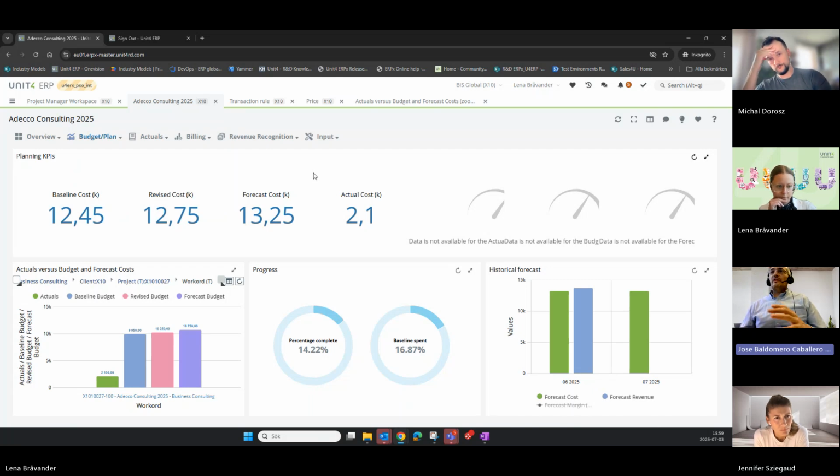I know the resources have changed. I planned a task in July, and now it will happen in October. In August, I have a task where I need 2 guys. This is adding cost, and adding cost will mean changing the forecast. So that means in the resource request tool, I would request 2 more people for that project. I will create another request for my project, and this will mean that the forecast cost will increase.